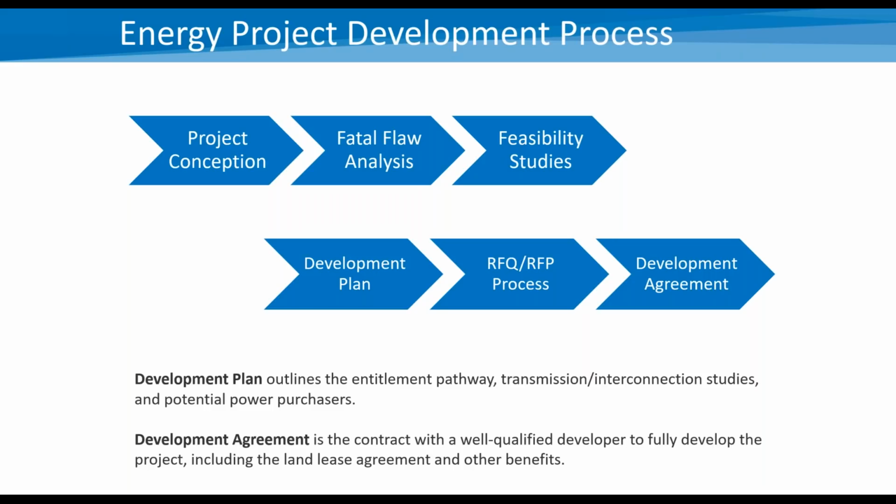So the best practice here would be to establish a formal and transparent process where a developer is selected based on an open, competitive process. The idea is to conceive of the project, run a quick back of the envelope type assessment to make sure that there's nothing completely blocking the potential for the opportunity, and then begin to prepare a feasibility study.